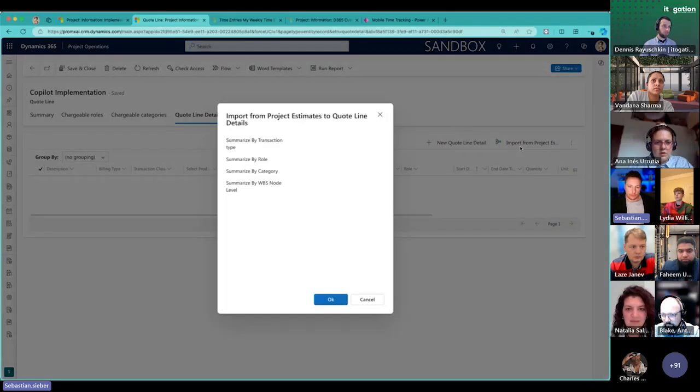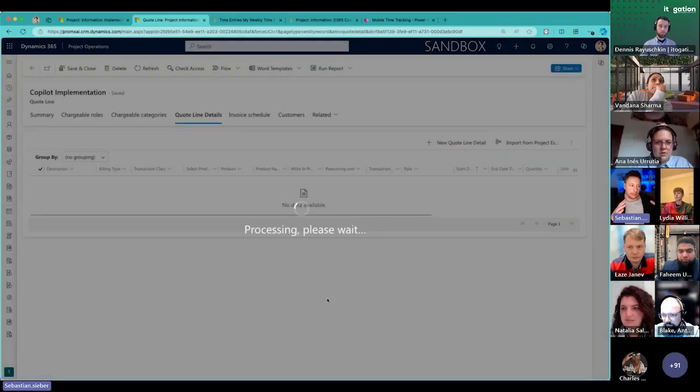So from a business process perspective, I get my quotation in as a sales manager based on ERP, based on my sales process, and then give it to a project manager who can plan the whole thing out, and can also block resources or block time independent of generic resources, which are not real resources. They're kind of placeholders. And I can see that I need those kinds of resources within the next month, for example, certain developers or certain skilled people.